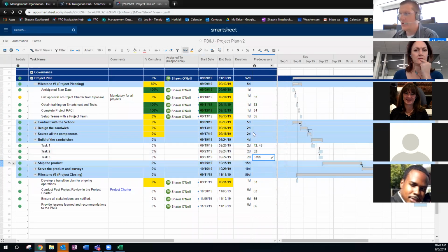Those are optional. You can do the old way or the easier way or whatever you want to call it, with just setting your dates for each of your tasks and manually moving them around. Or you can use predecessors to build your initial schedule. Or you could do this and then later on delete them afterward and it will leave the dates alone. So you could do that to start with and then later on remove them whenever you want to play with your schedule a bit. So you have the options to do that.